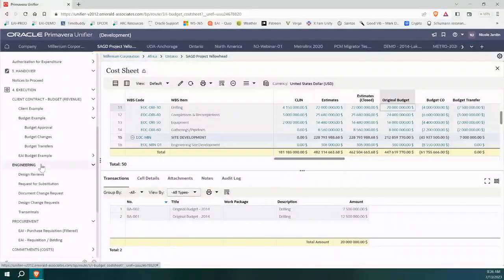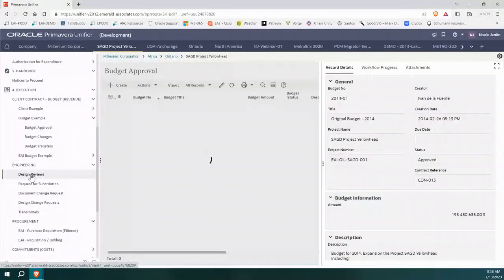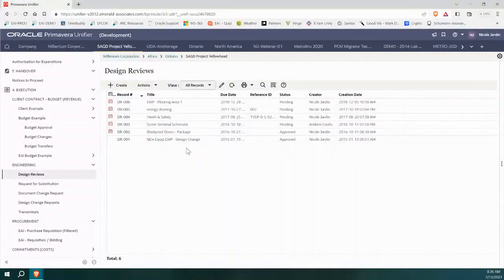Now, procurement, of course, comes from engineering documents. Okay, so we have some drawings, we have documents, and the designs can be documented and then changed. So we have changes that can take place on them. Okay, so that's where we start to actually have drawings. And in this case, the drawings should be reviewed and approved. You can see that some of these have not been approved, and that's what this little red calendar is letting us know, is we're late on getting these reviewed and approved.